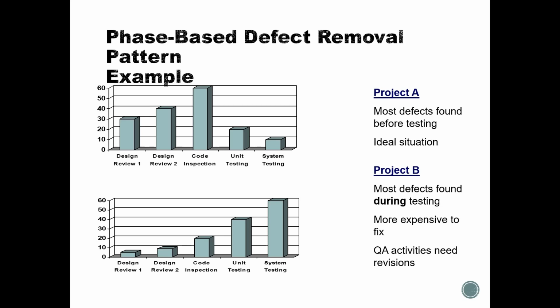If this is an iterative agile development work, this means that we are probably adding too many things at the same time. We design the changes and then try to cram them together, and the system fails because it's technically more difficult to do huge steps than a number of small steps.